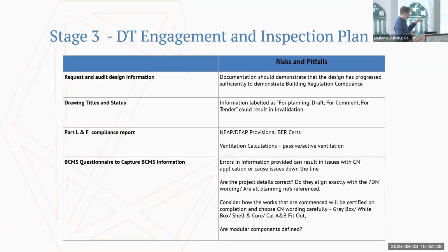In that document as well, this is how we do it. Obviously other people would do it differently, but we try and define the design responsibility here up front and early. So in a lot of cases, maybe the structural engineer or the architect is obviously responsible for the whole, but maybe not responsible for certain specific aspects of that design.